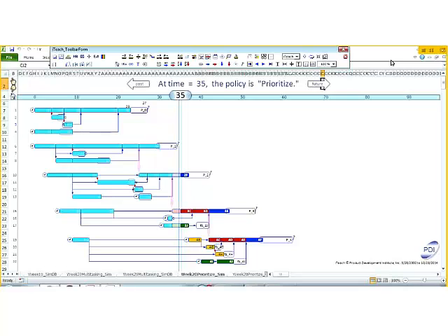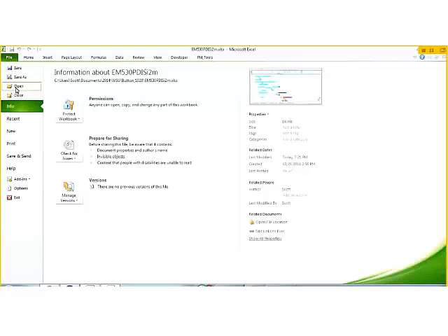It's probably going to take more time to switch than we really have, but at week 20 we scheduled each project as an individual critical chain project, resolving resource contention within the project but not across projects. Then you simply create a drum schedule where you stagger the projects on the drum. Then you freeze the projects that start in the future and work at a full level of effort on the projects that are underway. It's kind of this overall multi-project approach. Simple.